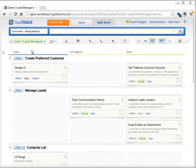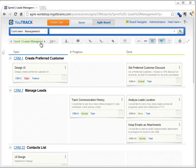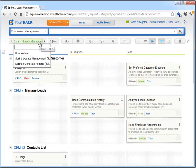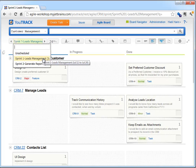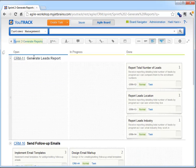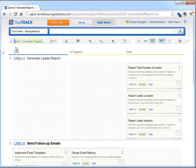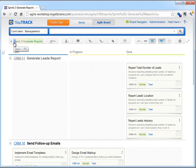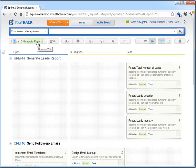Once the board is set up, as we're working with Scrum, we need to define a series of sprints. Sprints are represented on the top left of the screen, and from there we can navigate back and forth through the different ones, as well as create new ones. Color coding provides us with insight on the overall state of the sprint, whereby we can see each state represented in its own color, and hovering over gives us percentages of each one.